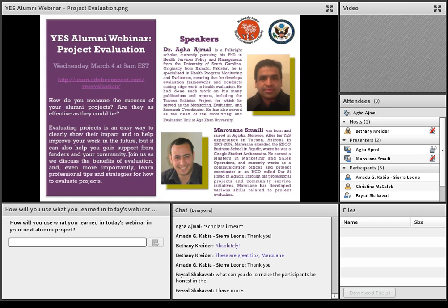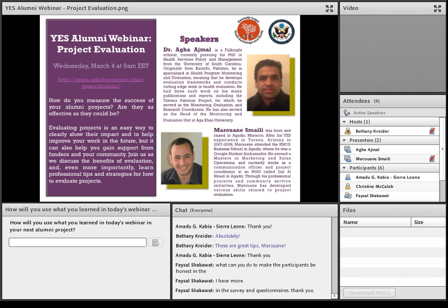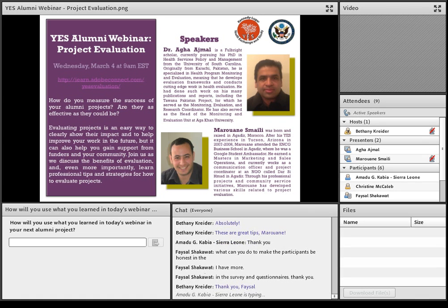Yeah, I can answer that. This is not an easy question to respond to, but what you can do is involve more people as outsiders, like other stakeholders, to come and evaluate and monitor your project, because you are part of that project and people may not respond the way they want to. We call it in research the Hawthorne effect, where they want to respond to please you, the socially acceptable way of answering the question, right?